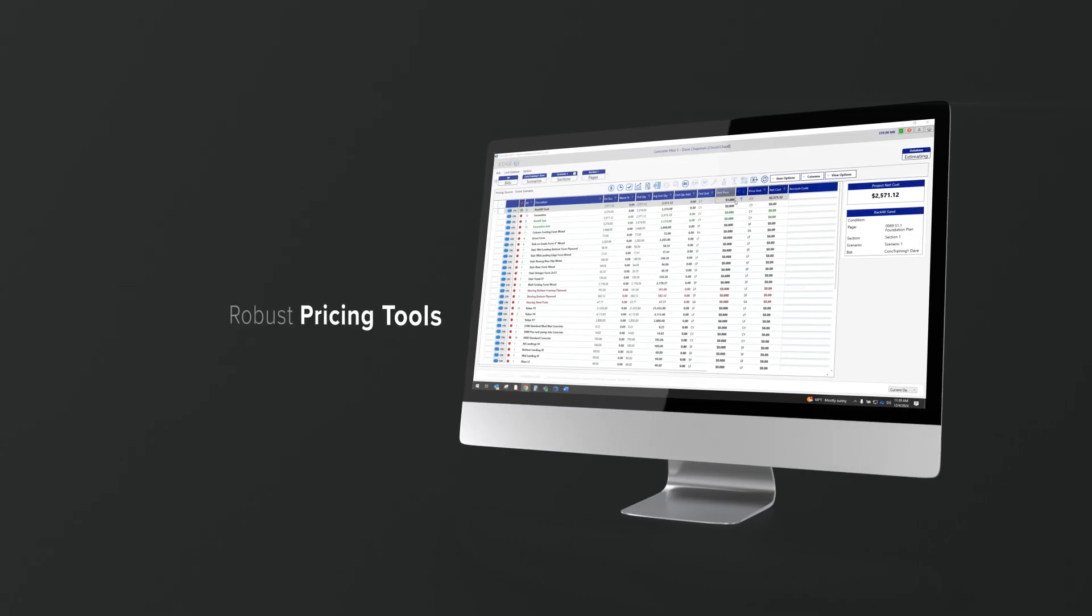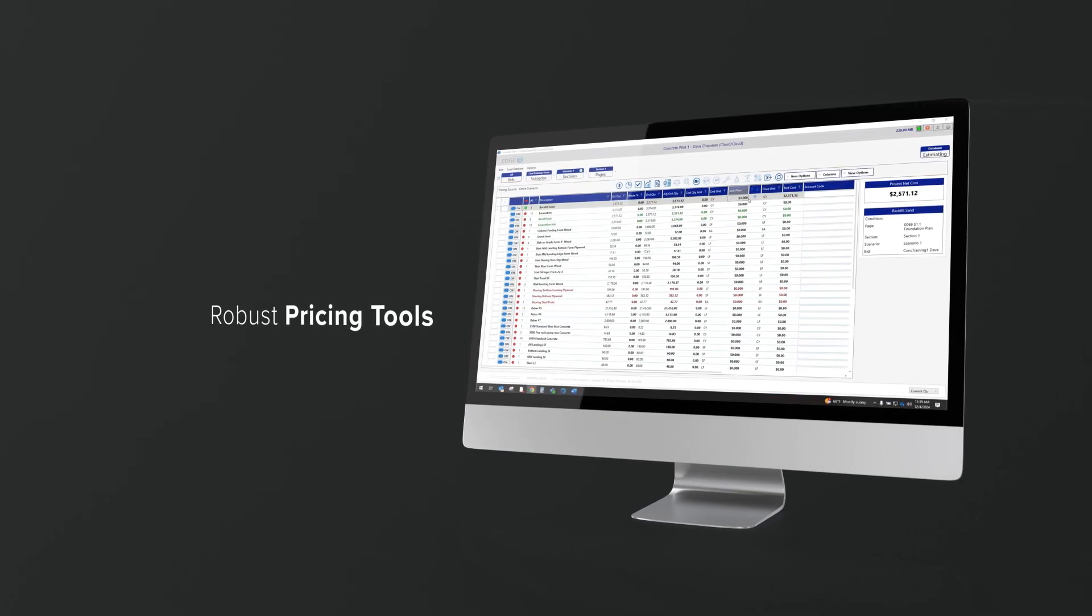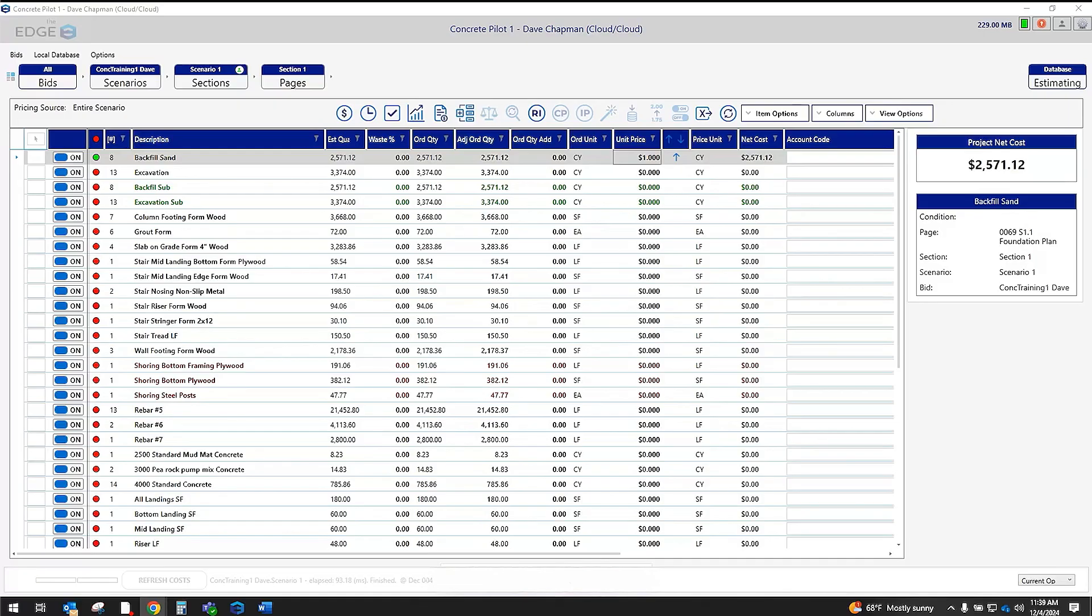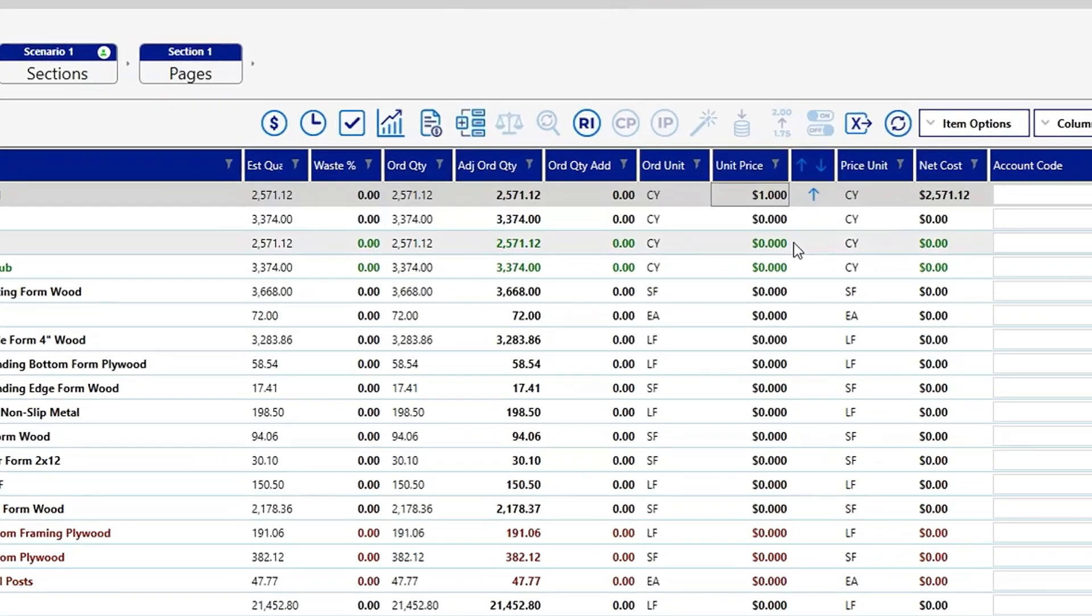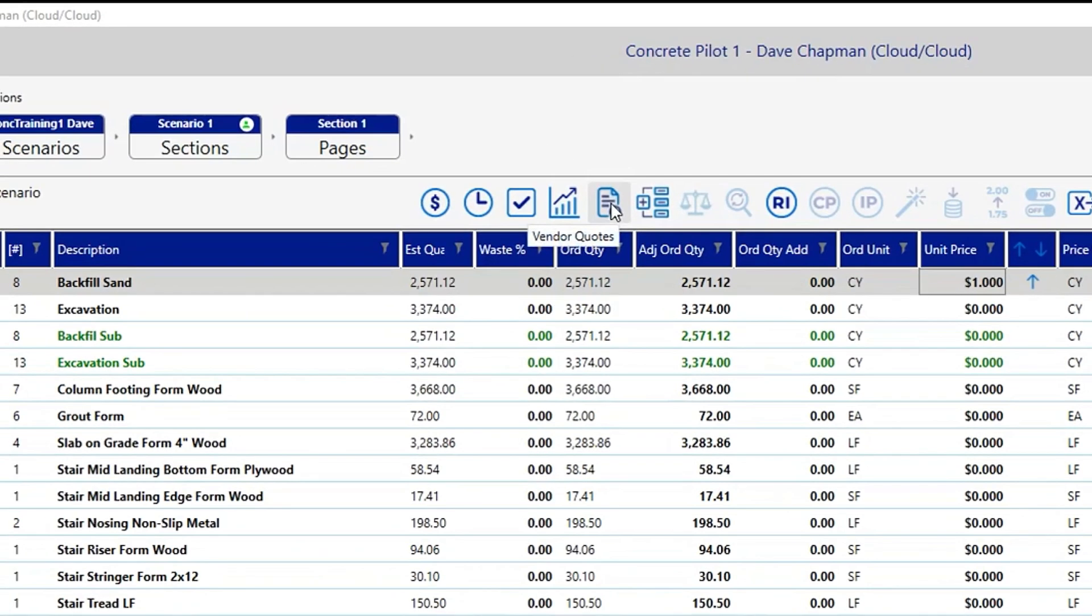Now, you'll be able to update your pricing, use historical pricing, or even better, you can send a link to your suppliers to get updated pricing using our vendor quote feature.